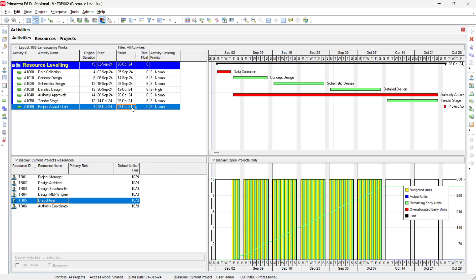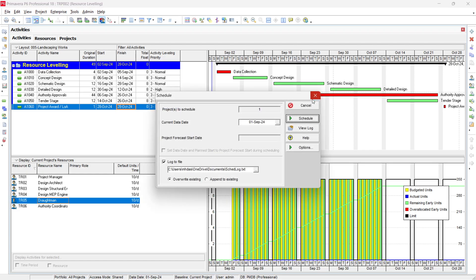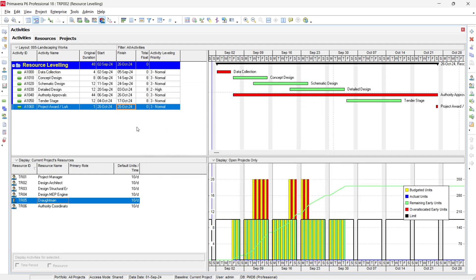After leveling, the project completion date is extended by two days, which may also impact project cost. This is only a 'what-if' scenario to see what happens when you level resources. If you want to revert back to the original schedule, just press F9 and it will reschedule and return to the original 26 October completion date.